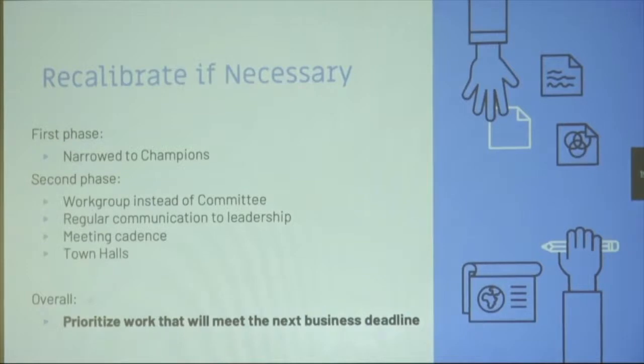and consistent. We also held some town halls and we did a lot of road shows, traveling around and demoing to the departments, to the users, holding office hours, answering questions, all of these things so that we could really just take the work that we had done and leverage it to set the field for future success. And overall, the main takeaway was always prioritize the work that will meet the next business deadline and make sure you hit that deadline.